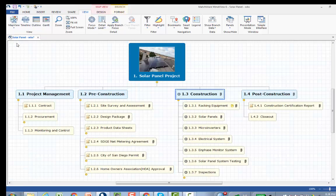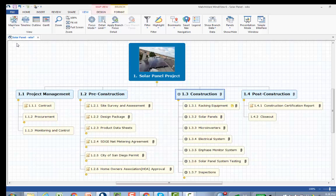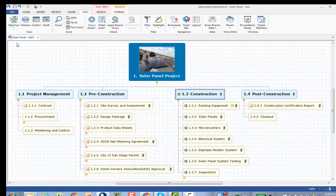This is the solar panel WBS. I was able to demonstrate how I started by analyzing the statement of work. I then added additional information after I had project meetings and telephone conversations and received emails regarding this project. I was also able to do research on the web to further understand the requirements for the design package and permits and add those links into the mind map and update the WBS.